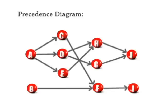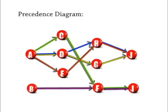We can use this diagram to identify our paths. For instance, we have path A, C, F, and I. We have path A, D, H, and J. Path A, D, G, and J. And path A, E, H, and J. And B, F, and I. So we have five paths through this project.